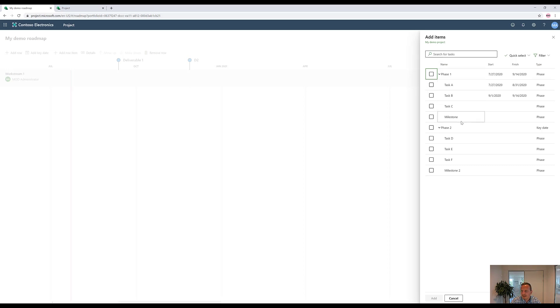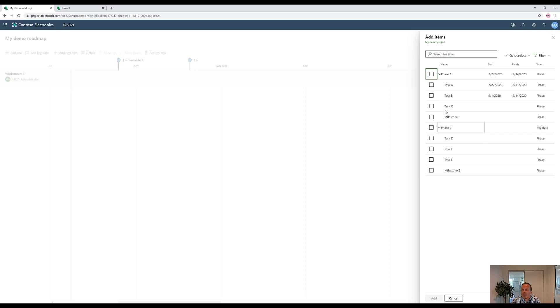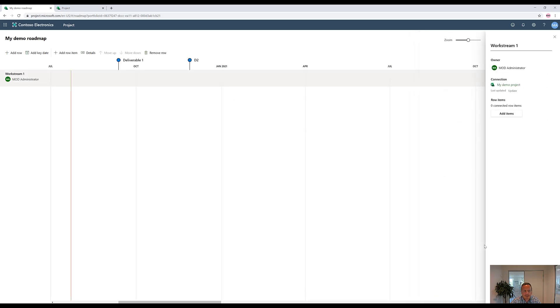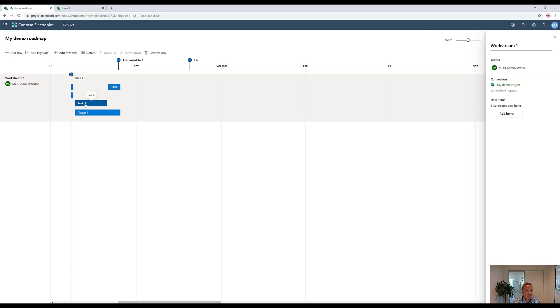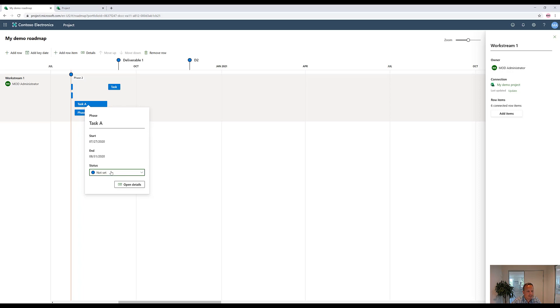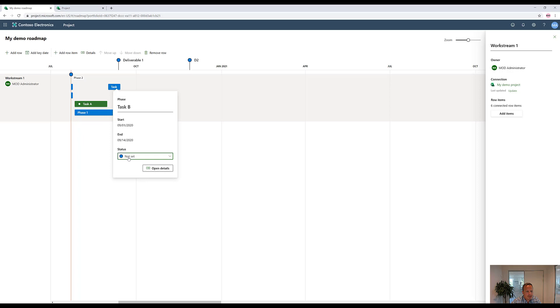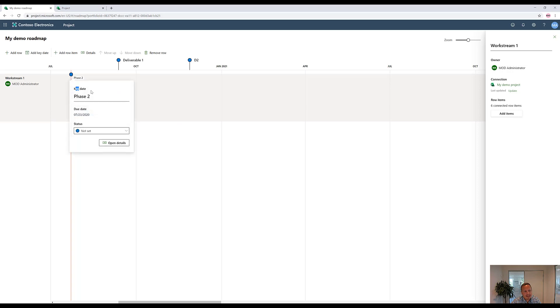Here we can now see all the tasks that are coming from this specific project plan we just did. The phase, the tasks, the milestones. We can do different filtering on all milestones, only the summary tasks, top level tasks for that matter, or search freely for tasks if you have a lot. Now if we select everything and click add, you will see that those parts from the project plan have been added. You can also click on it and actually identify the status either by setting it or making sure that it gets synchronized with the project plan. Right now I'm just going to set it myself and saying this is on track. But this one perhaps is at risk. This actually shows a milestone. So here you have a key date which you can then compare later on to the deliverable up here.